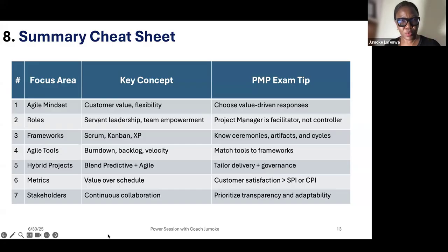Artifacts are documents that you create in the process of the project, and also know the cycle that the product owner would populate the product backlog with the customer, and then the customer and the product owner will prioritize the product backlog, and the prioritized product backlog is presented to the development team or the project team, and they will pick what they can work on based on their iteration, based on the velocity. And I also said that the velocity is based on the number of story points the team can complete in an iteration. Okay, so you need to know this.